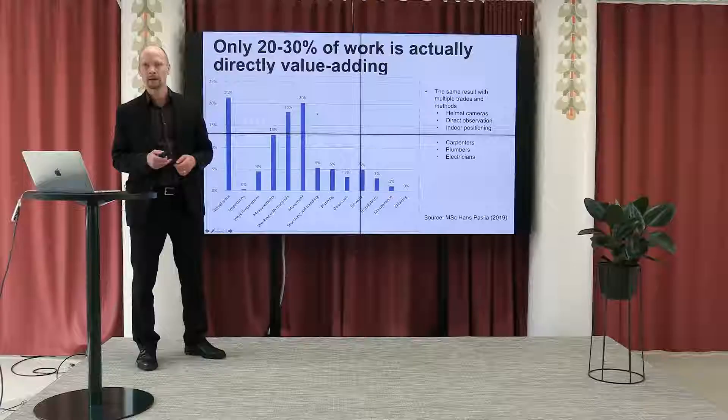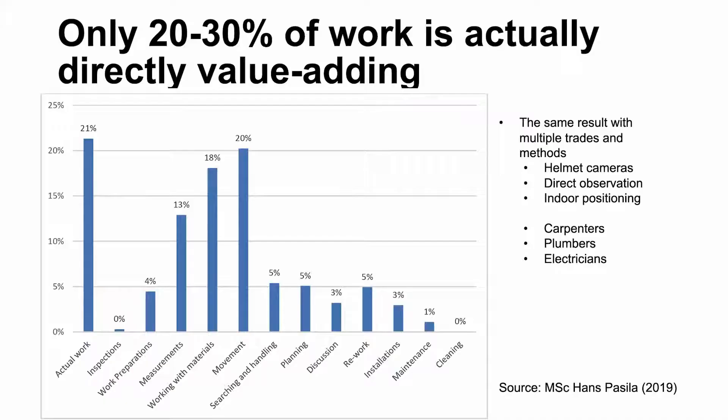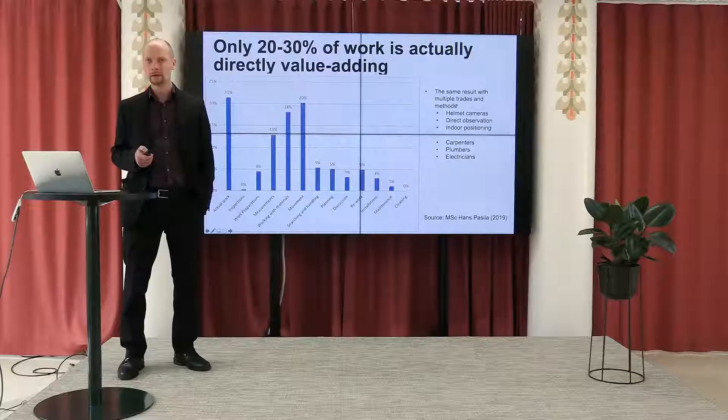We have achieved the same result with multiple trades using different methods — direct observation, helmet cameras, indoor positioning systems — evaluating carpenters, plumbers, and electricians. They all show similar results. In some projects this may be 30 or even 35 percent, but at maximum we have measured 30 to 35 percent value-adding time in construction. It means that 70 percent of the time is wasted and we are not getting the full capacity of our workers.